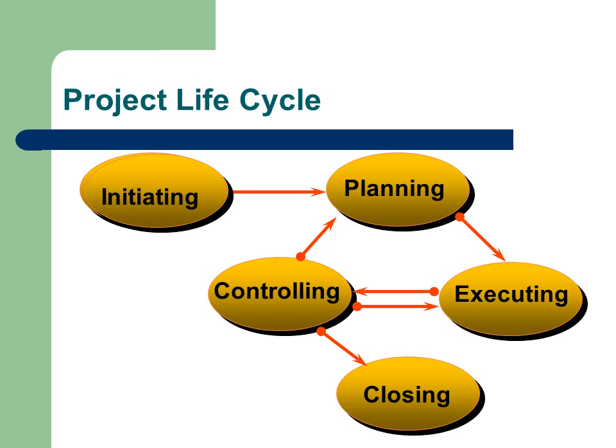It involves measuring the progress of the project against the baseline plan to determine if it is progressing as expected. If not, then appropriate actions must be put in place to keep it under control. Closing. This is the phase where the project deliverables are handed over to the customer, contracts finalised, and resources released. It is also the time to reflect upon project successes and think about what could have been done better. Project phases may have different names in other organisations or textbooks. However, they can all fit within the generic PMBOK-defined project phases.